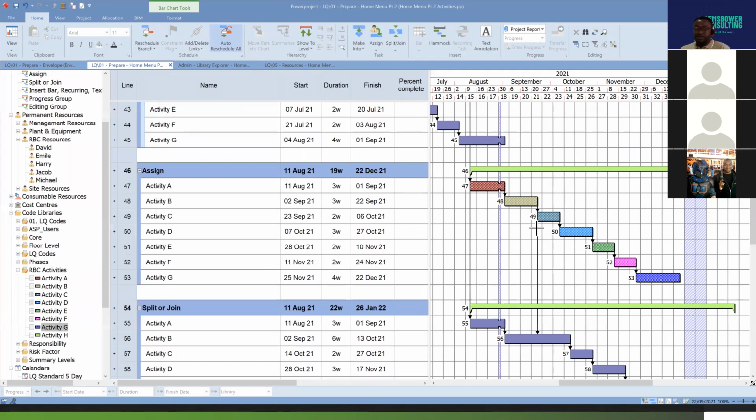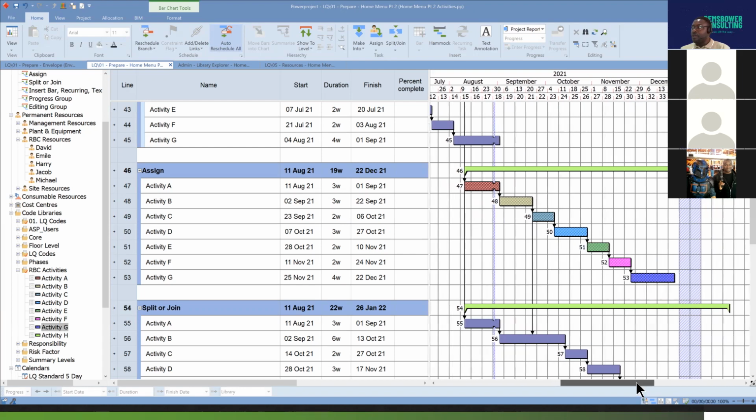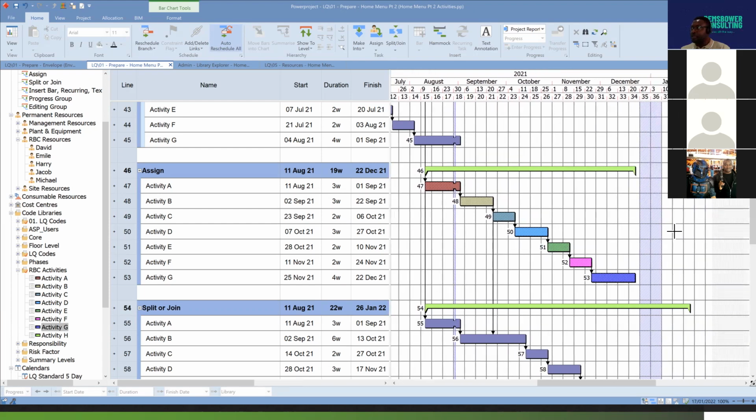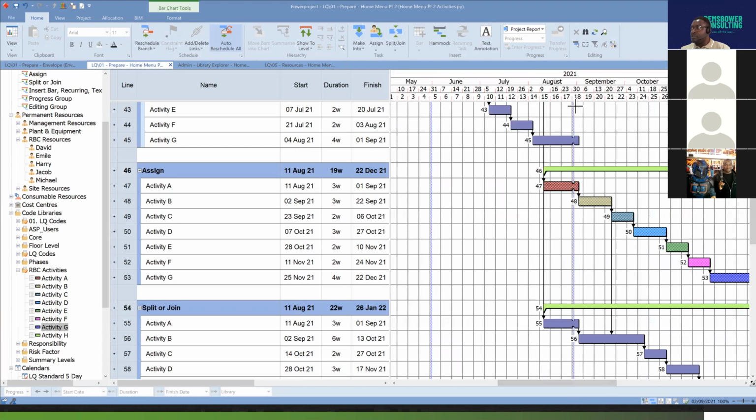We'll be using this more at a later time, okay? Then we'll look at calendars. Now, if you're looking at my screen right now, you would see that there is some shading there. See that shading between December and January coming down? That is the holiday period where construction is not active on site. Okay, that is the August 30th holiday coming down there for the year.